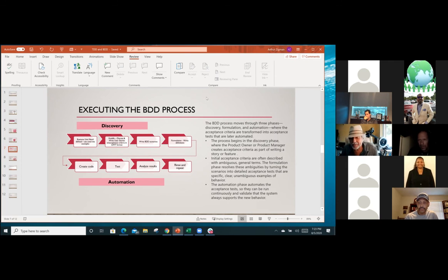So let's think about where you are in the overall process for your project, right? So if it's the first sprint, then call it iteration 0 and spend some time on this before they start coding. With BDD, the testers aren't writing the acceptance tests. They are written before you enter the sprint with BDD, and those are imported into the code.